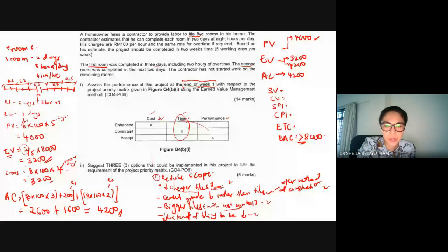So if you look, most of the time we get responses such as, okay, increase workers. Okay, so increase workers, you would reduce the time. So you might get back your time within the frame that you are required, but you will increase the cost. Okay, so you have to be careful.